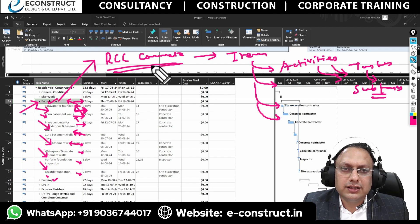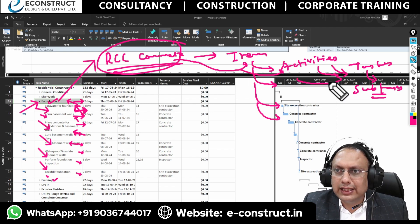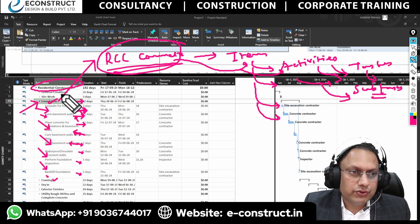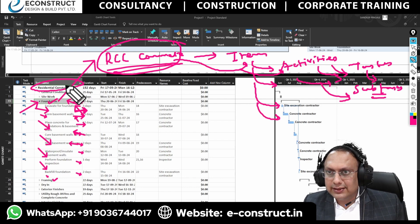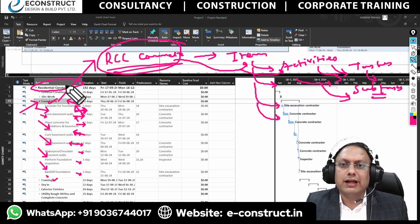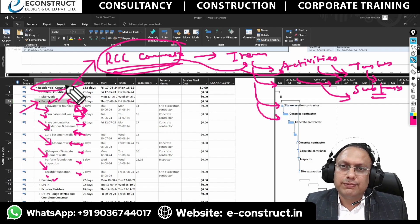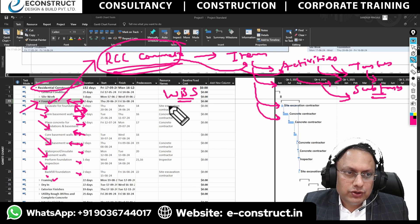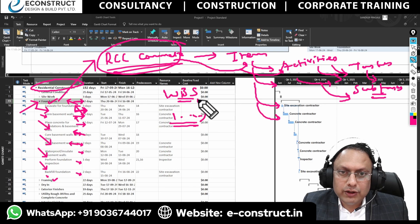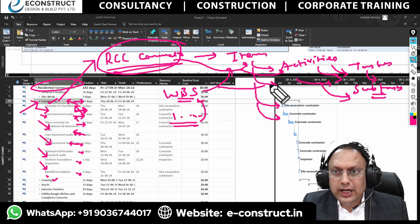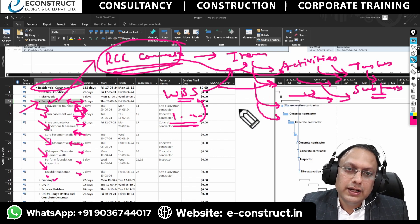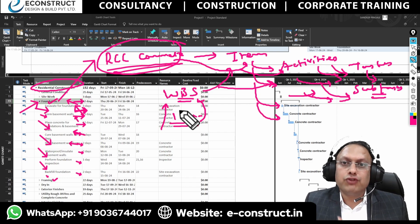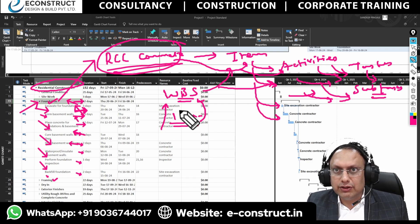This is how you look at the macro level down to the micro level analysis. Let's say there is RCC in a residential building — what are the tasks, sub-tasks, activities, and items? Many people face a lot of problems developing this, which is known as the Work Breakdown Structure (WBS). The WBS will have certain item numbers; sometimes it needs to be broken down further into activities, items, tasks, and sub-tasks. When it comes to tenders, the system is different, but you need to be comfortable identifying all the tasks, items, activities, and sub-tasks.